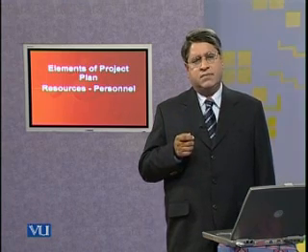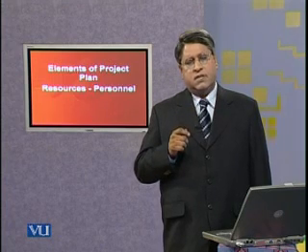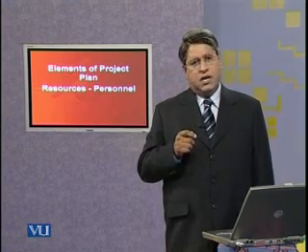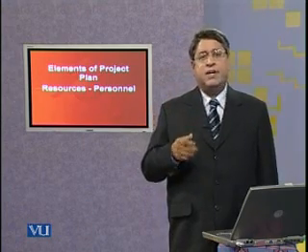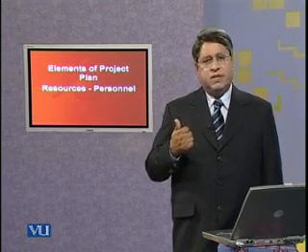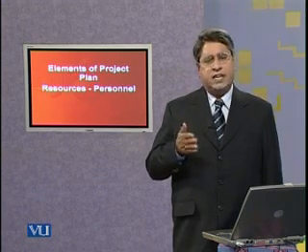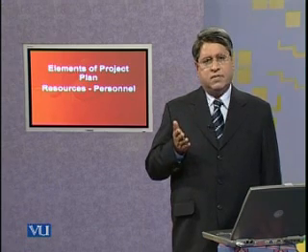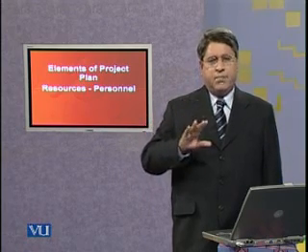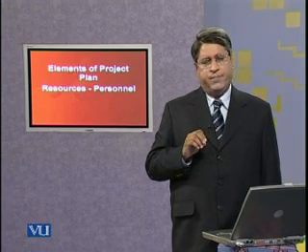There should not be a situation where one of the critically important expense resource persons is waiting for something being developed by another team or group. If you have engaged them, called them, but the product is not ready, which is going to be used as input by that individual or the team, it's a wastage of resources, human resource. In fact, the technical experts are very expensive. So in your scheduling of resource allocation, other than hardware, manpower and human resource are needed. One more important point I would like to emphasize now here.